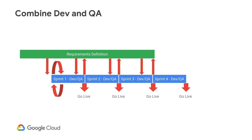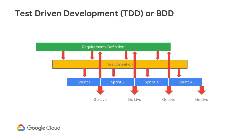Make this your first goal for the team. Just testing furiously during development isn't enough. We need to incorporate the principle of definition of quality upfront. If developers are not fully aware of the test criteria, or QA engineers have to spend more of their time defining the test criteria in the sprint, precious time will be wasted. Have the QA engineers and the developers work with the requirements to define the test criteria ahead of the sprint.